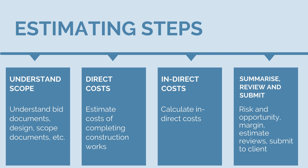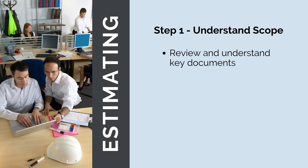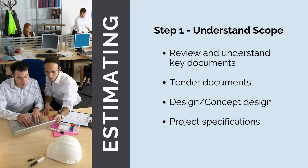We'll need to work out our risk and opportunity, margin and corporate overheads and add these to our costs to submit to the client. We'll also need to get the estimate reviewed internally by our management staff. Before we get started on any pricing, the first step is to understand what we're being asked to build. We need to review and understand all the documents that define the project scope, including the design or concept design, project specifications and any other relevant information provided in the tender documents.